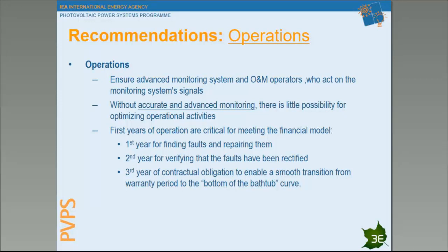And then what I said before: the first years of operation are critical for meeting the financial model, and that's why we talk about the 2 up to 3 years, including the first year for detecting some faults and repairing them as soon as possible, still within warranty periods.